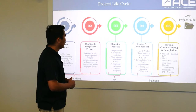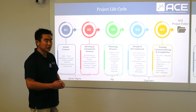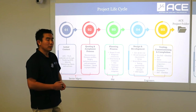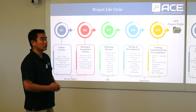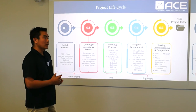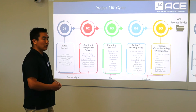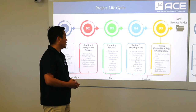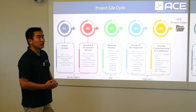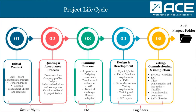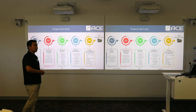The fourth stage is design and development — that's where engineers come in. We make a list of hardware and software needed for the project, compile IO and functional requirements or descriptions, and prepare IO list mappings. If existing site materials are not enough, we review screenshots from the site. Testing requirements are also taken care of here, and we prepare training and other manuals for the project. Lastly, safety and design reports are also completed.